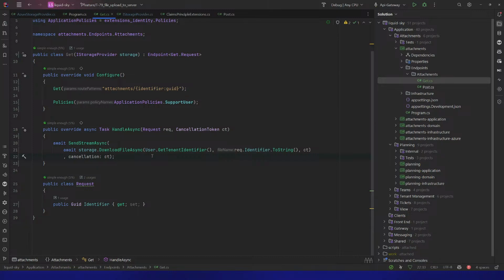The problem is that what often happens is we start to do some of the things wrong. We start to cut the corners, and then it doesn't feed back into itself, and it starts pushing itself out in different areas, right? So once you start estimating and then points being associated with days, people start chasing you, and then you start to worry about it. So then you start pointing lower, or your pointing gets thrown off. So you're not actually using the system, even though you're using the system. And this is what people find hard about Agile, and what they hate about Agile, and Scrum, because it starts getting bastardized over time.